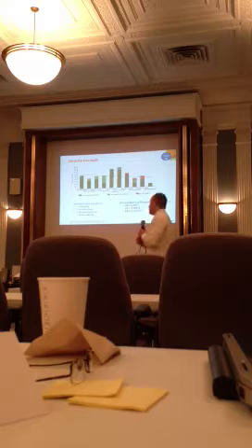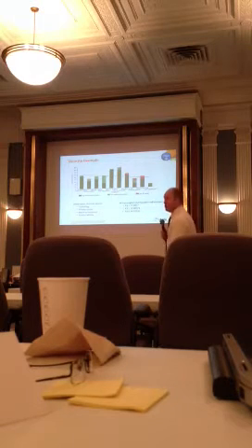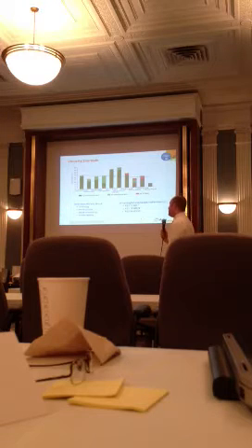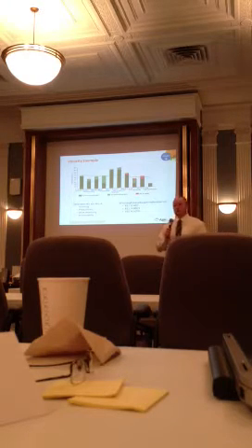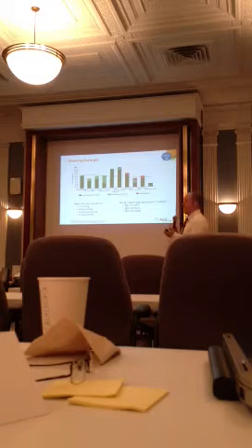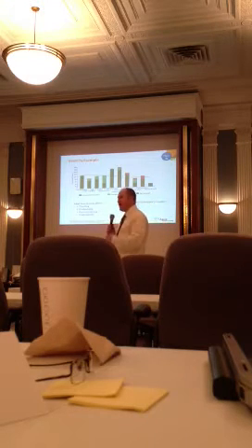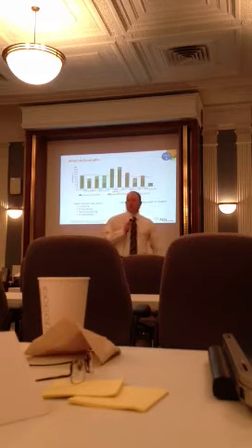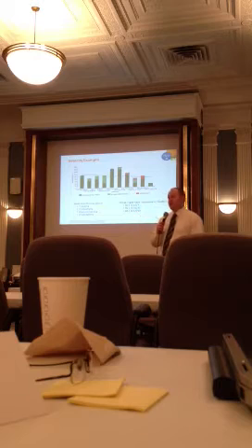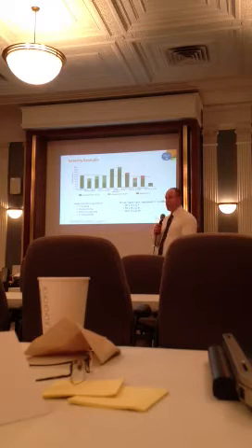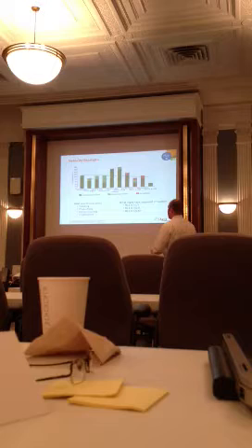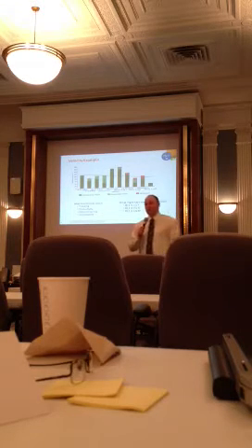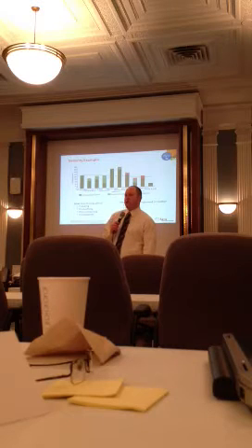Okay, all right, so back to this velocity line here. I let my team commit to 100 story points, and I was wrong, right? Because they only got acceptance on 80. So maybe we had defects come up because we know we're getting close to this launch date that we want to make sure we're hitting. It could have been a variety of things. Could have been churn in the requirements. Could have been a lot of things. But the bottom line is, in this iteration, I know that we caught up on all of that because we still hit that October deployment date that I mentioned, right?